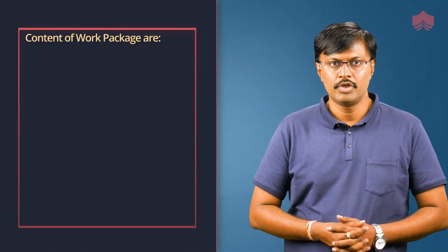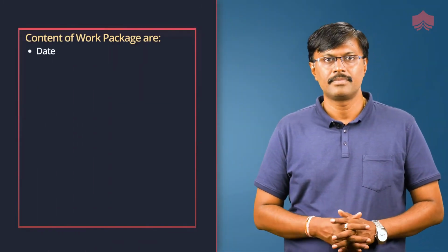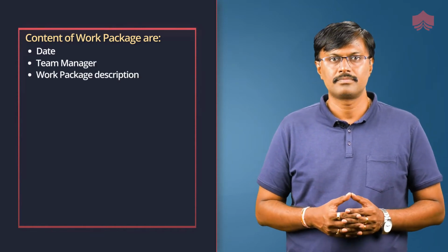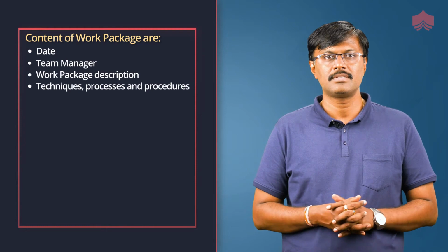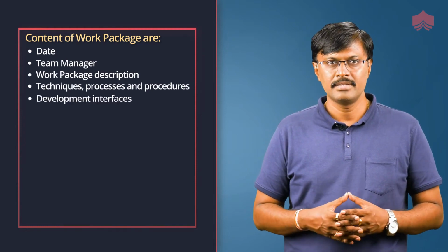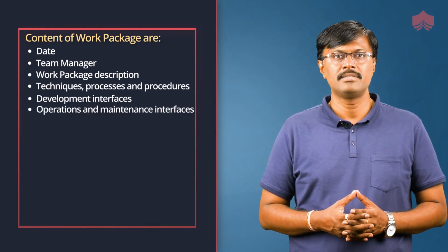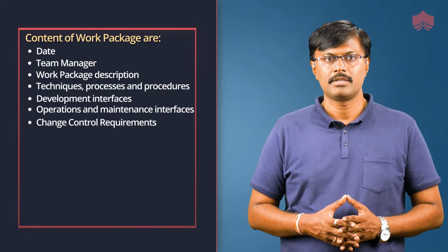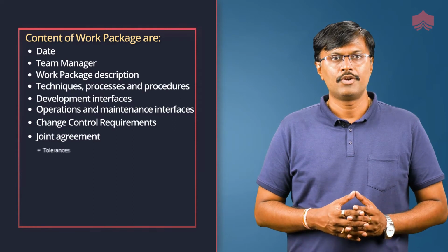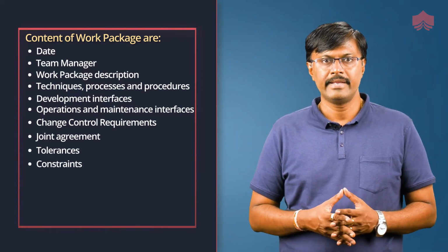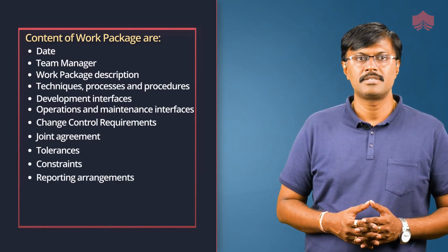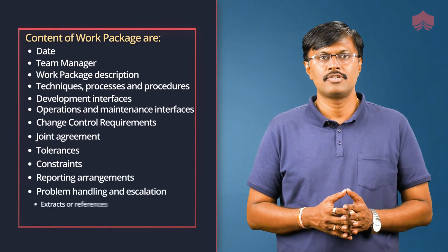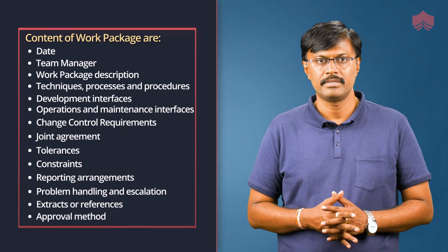The work package should capture the date, the details of team manager, work package description, techniques, processes and procedures, development interfaces, operations and maintenance interfaces, change control requirements, joint agreements, tolerances, constraints, reporting arrangements, problem handling and escalations, extracts or references, and approval method.